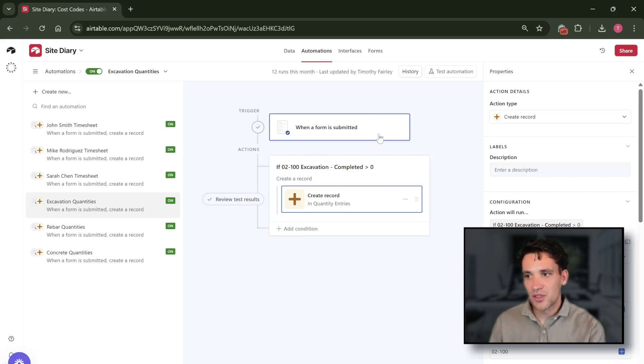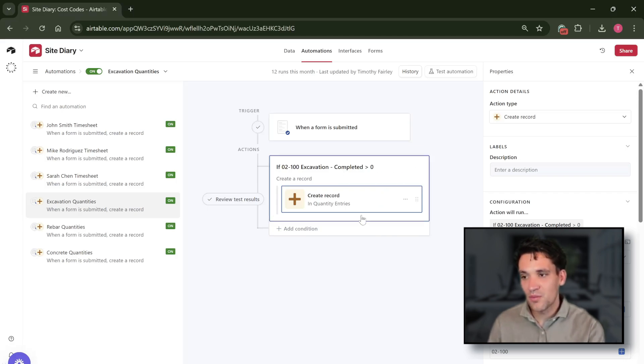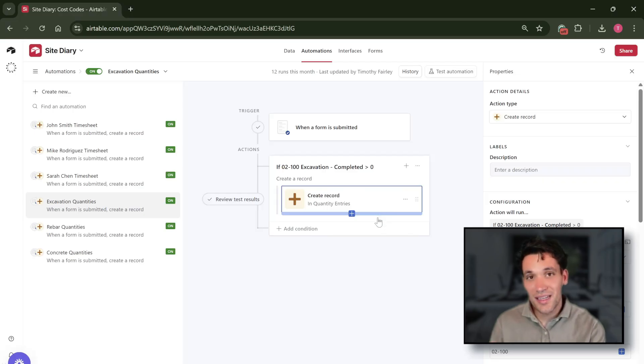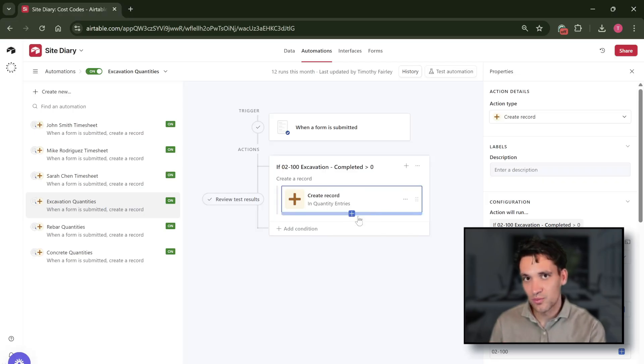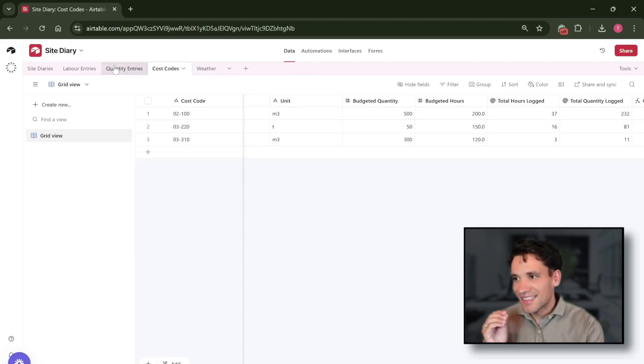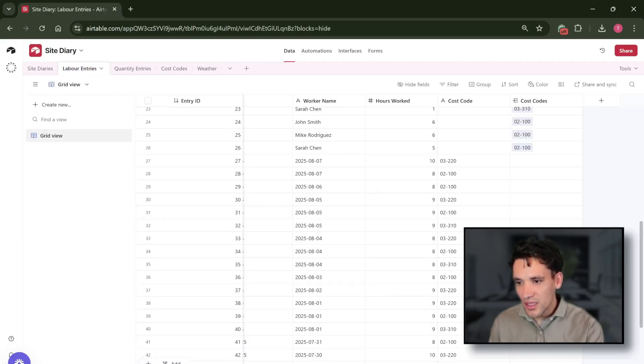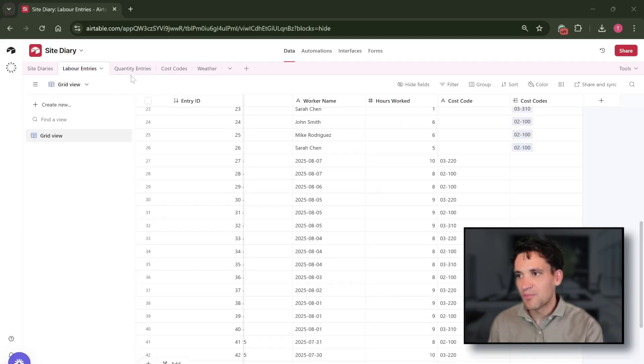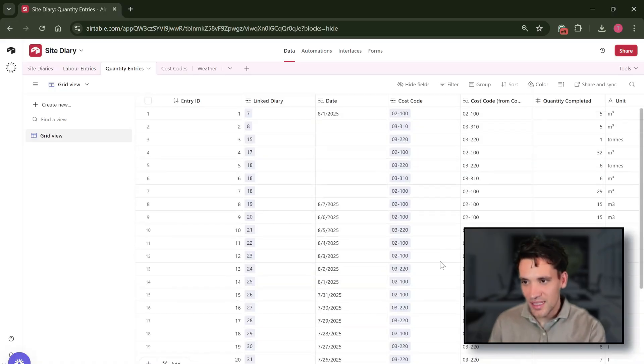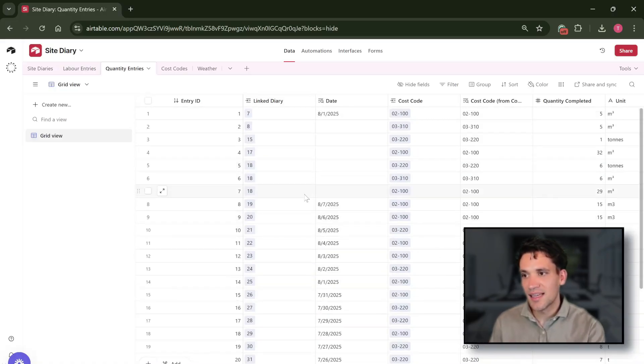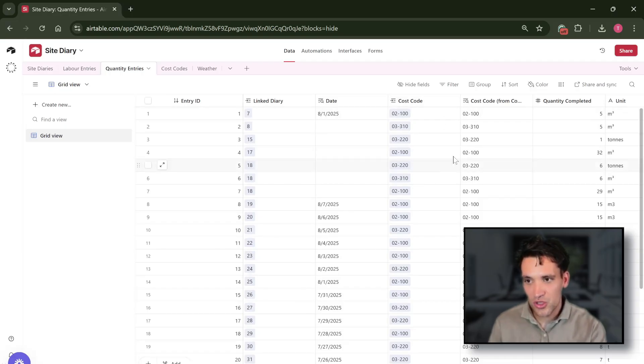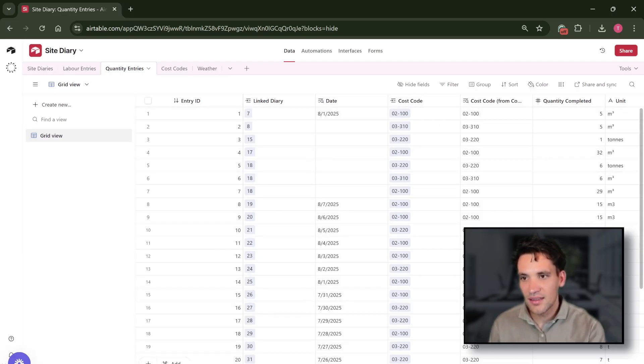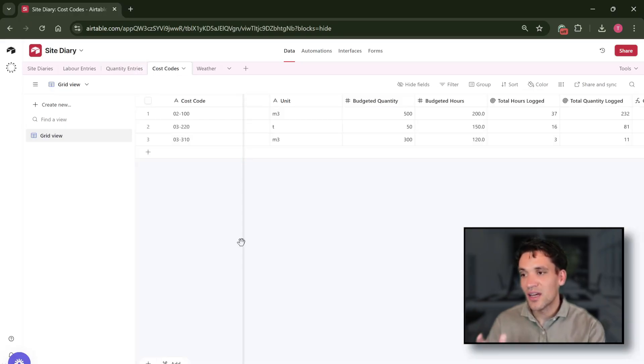Every time a new form is created and the excavation quantity in that form is greater than zero, we create a new quantity record in the quantities table. This then gives us a clean set of records of all the individual labor entries that were made and all the different quantity entries that were made, so we can see the entry ID, the linked diary, the date it was completed on, the cost code the work was completed under, and the quantity completed.